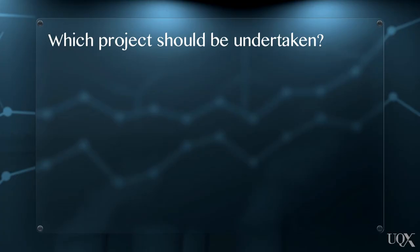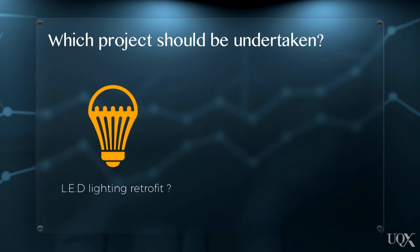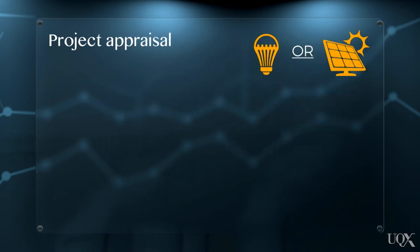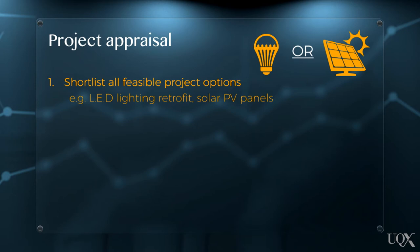Say, for example, an organisation is considering undertaking either an LED lighting retrofit or a solar PV project. The project appraisal process would involve, firstly, shortlisting all carbon abatement project options that the organisation could feasibly implement – in this case, the LED lighting and solar PV projects.